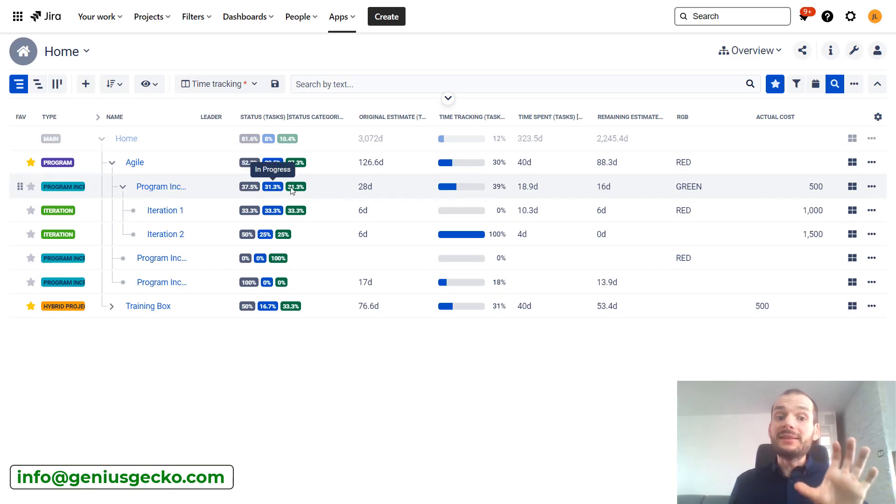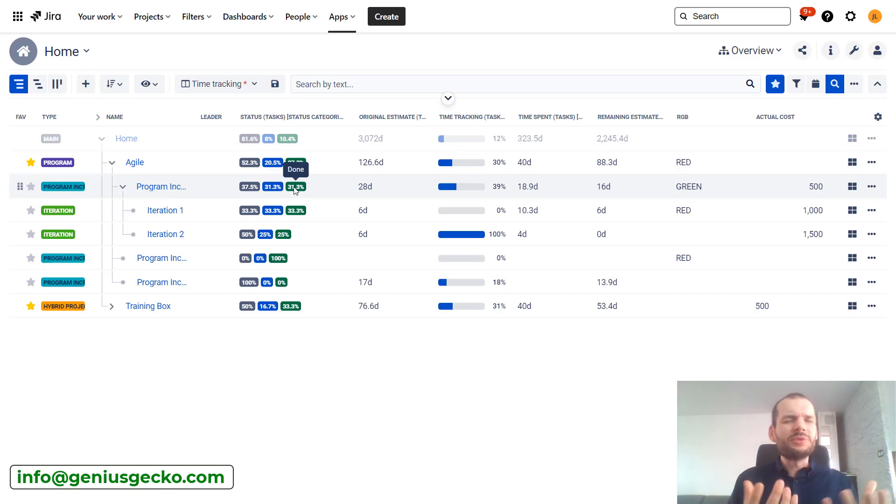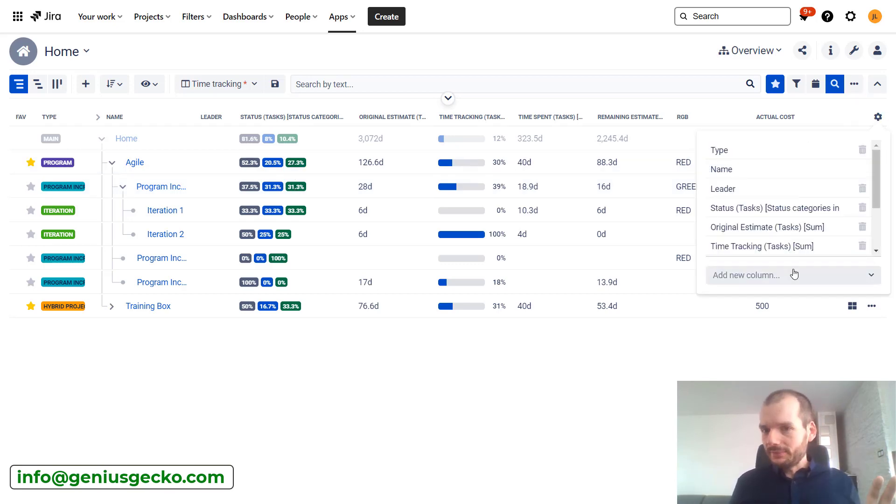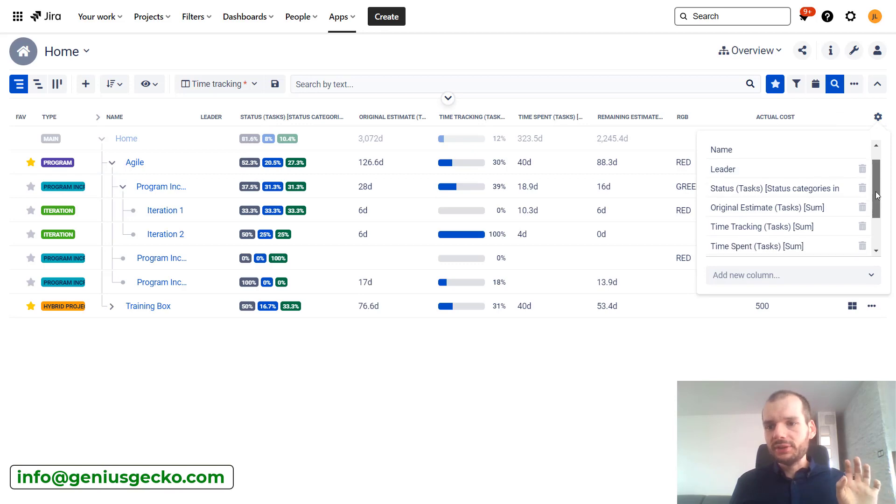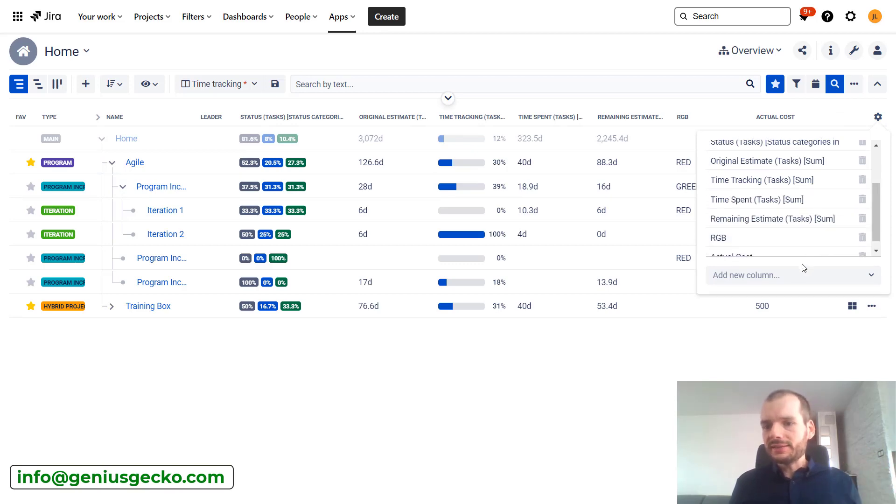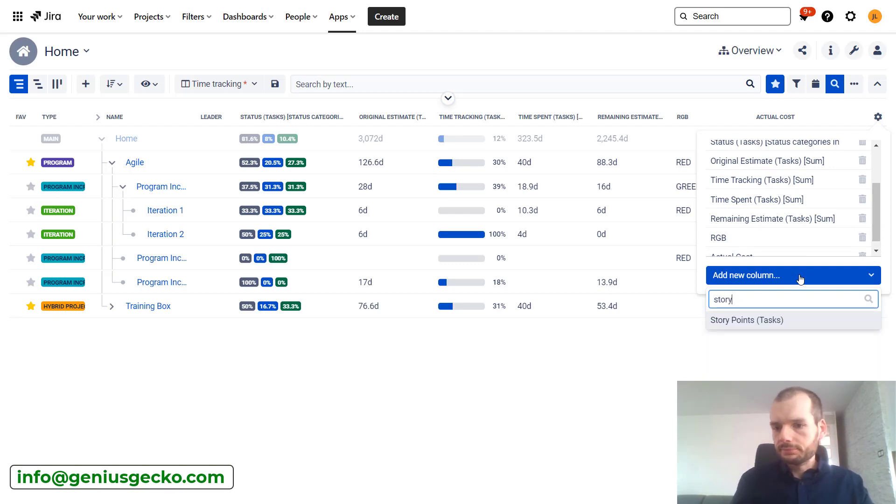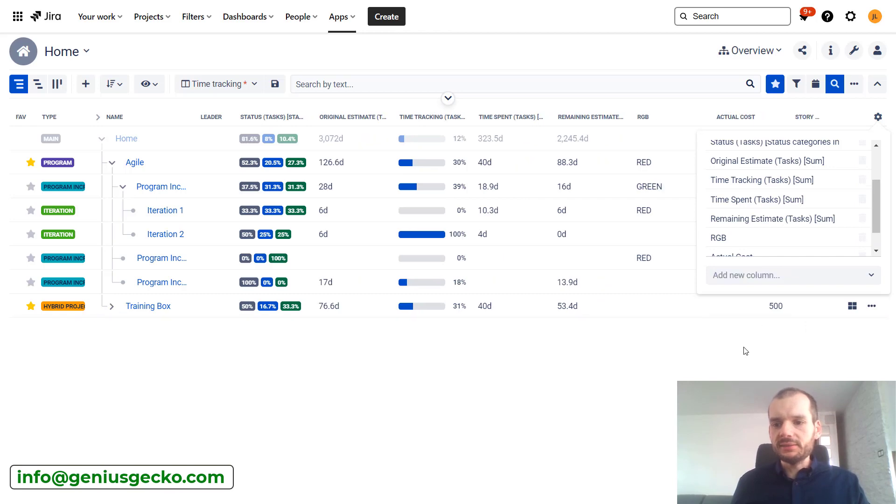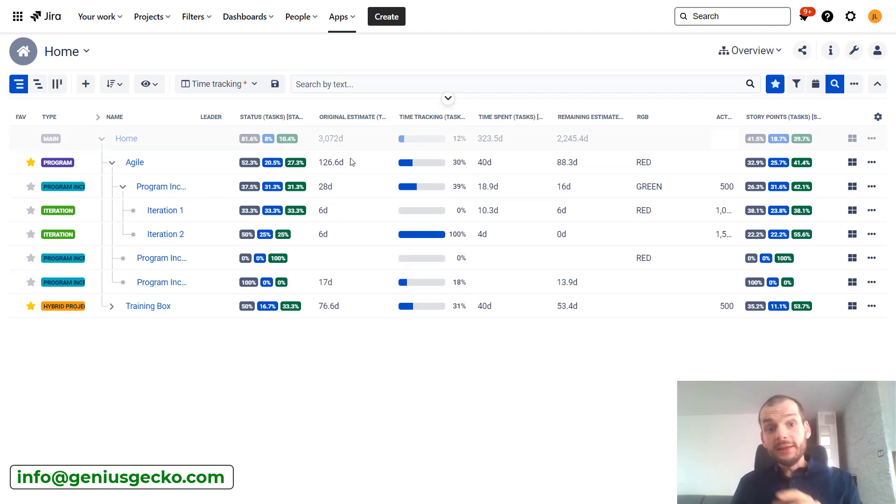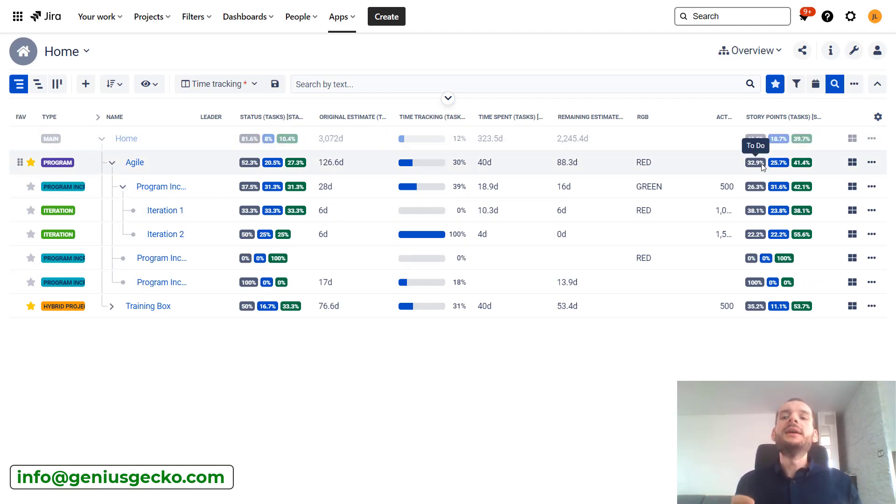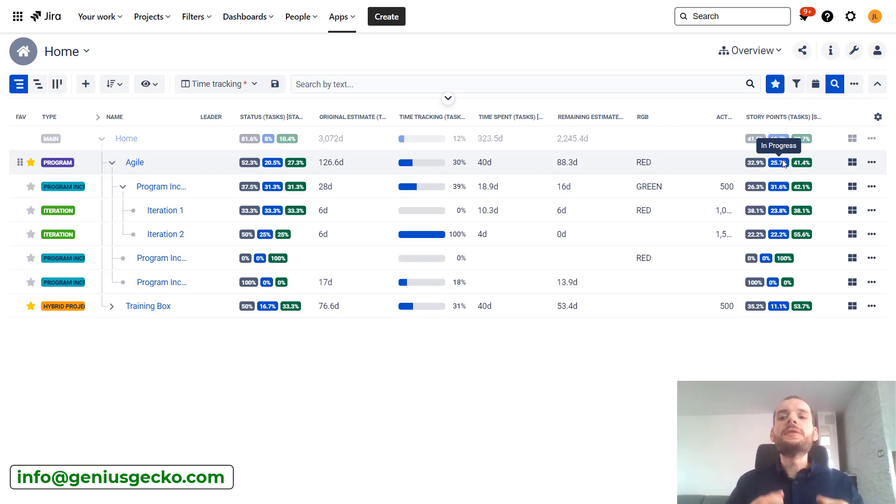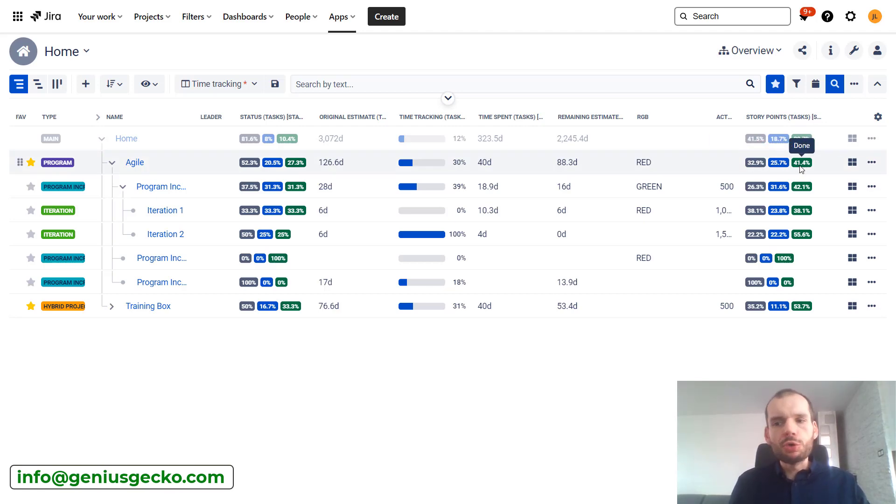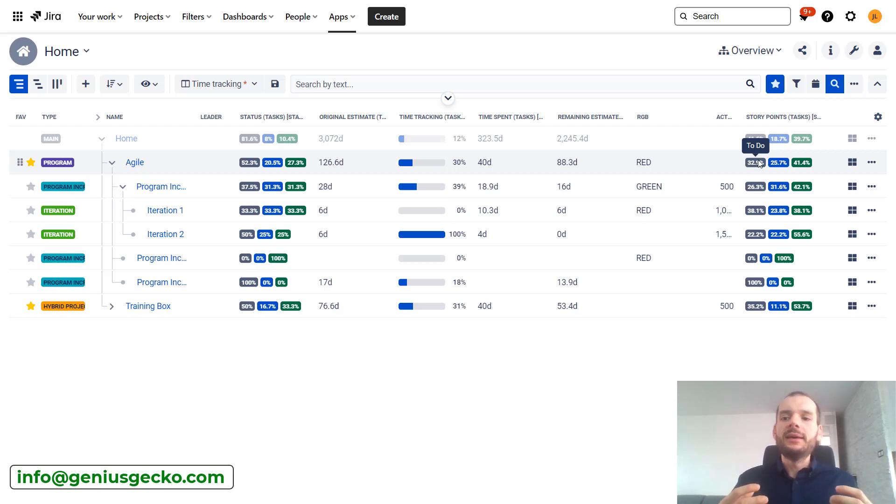But that takes into consideration only the number of tasks. Obviously tasks can be smaller or larger, so it won't be linear. If we're doing estimates based on story points, let's actually put the column for story points from the tasks. You can see that the column was added. It looks very similar to what we had in status, but now this percentage calculation is not based on the number of tasks but on the amount of story points. Tasks are kind of weighted, and here it looks better - more work is done and less is to-do. You can already see that very nicely we can pull out information from the box.